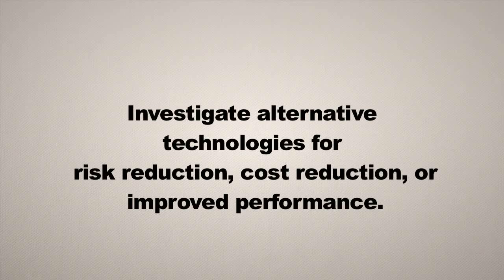Trade studies also help you investigate alternative technologies. There might be one or two different ways to accomplish a function on your spacecraft. Some use technologies available off the shelf, while another technology might need to be developed — it's new and not currently available — but it could offer better performance or more scientific return. You assess the risk of using less mature technology versus buying something already off the shelf and space-qualified, considering cost and design impacts.